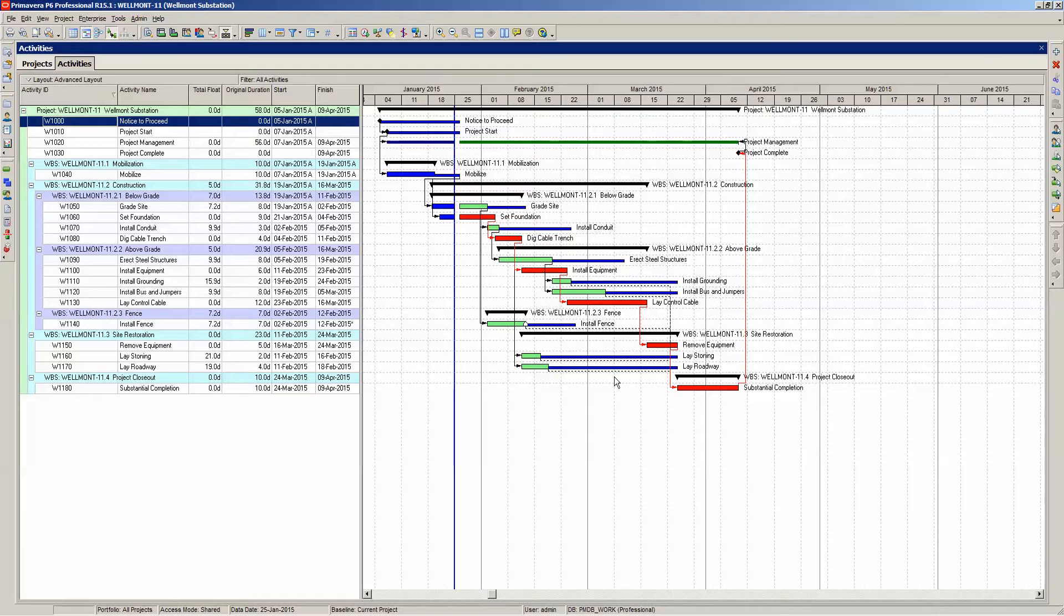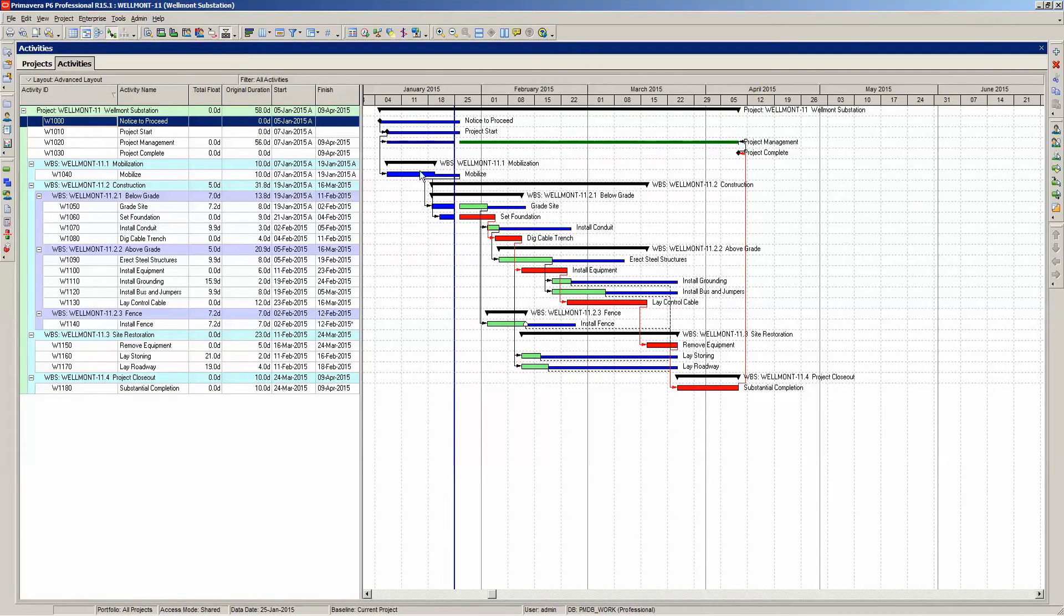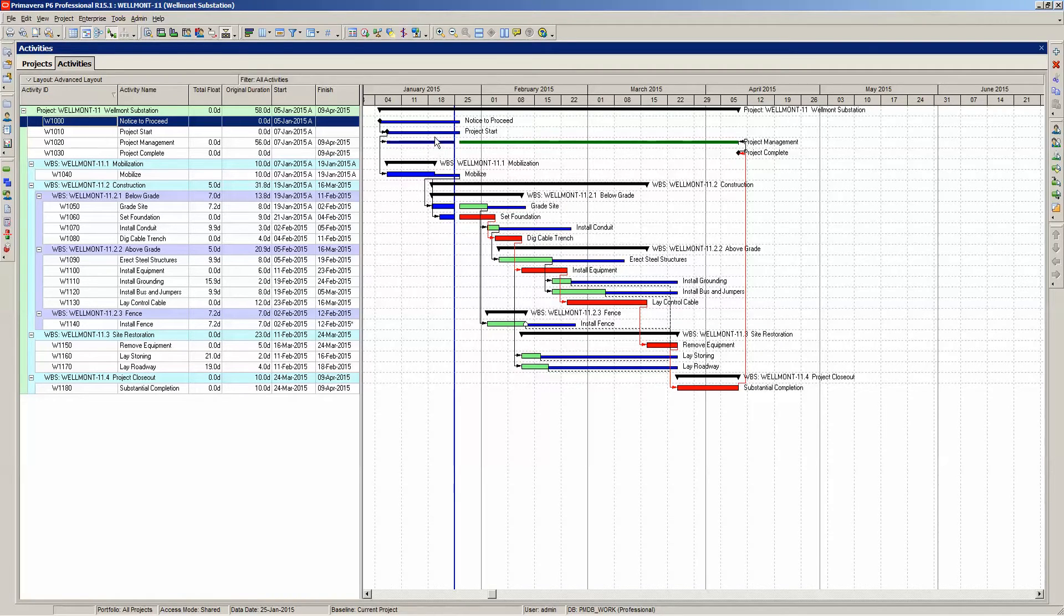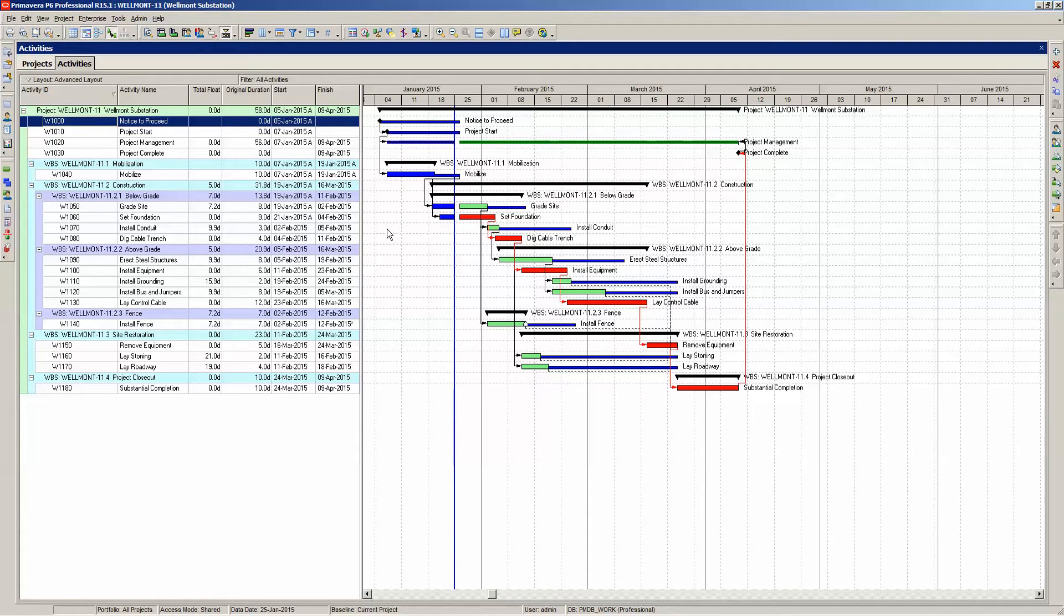But we've got a problem here, because activities that are complete, notice to proceed, project start and mobilize, are displaying total float. But that doesn't make sense, because the total float values for these activities are null because they are complete. So we have to slightly vary our float bar definition.